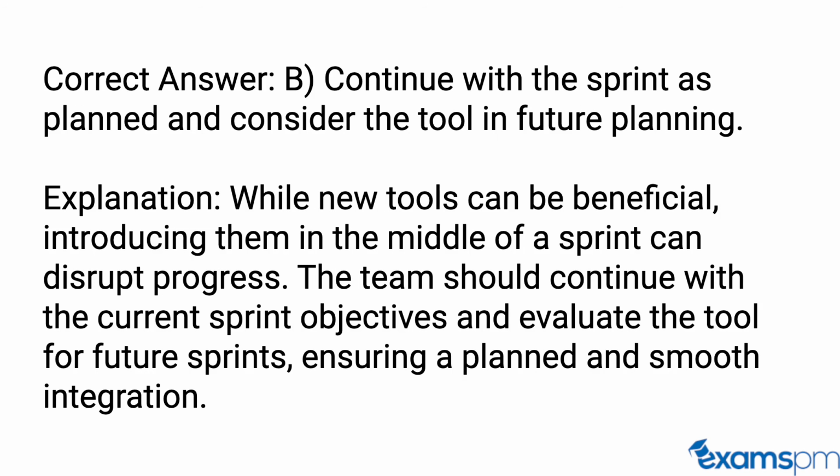Correct answer: Continue with the sprint as planned and consider the tool in future planning. Explanation: While new tools can be beneficial, introducing them in the middle of a sprint can disrupt progress. The team should continue with the current sprint objectives and evaluate the tool for future sprints, ensuring a planned and smooth integration.